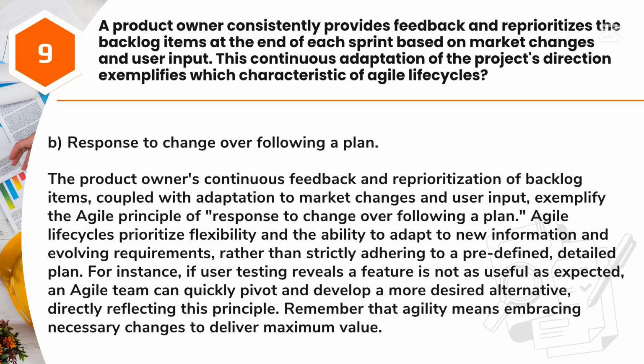Answer: B. Response to change over following a plan. The product owner's continuous feedback and reprioritization of backlog items, coupled with adaptation to market changes and user input, exemplify the Agile principle of response to change over following a plan. Agile lifecycles prioritize flexibility and the ability to adapt to new information and evolving requirements, rather than strictly adhering to a predefined, detailed plan.